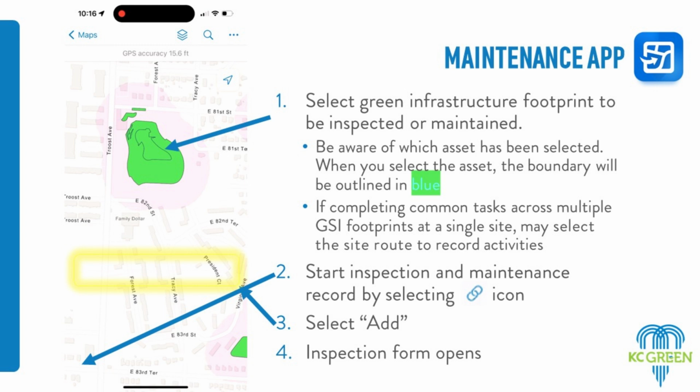The litter index, appearance index, functionality index, that's what Ashley spoke to earlier, the 1 through 4. It should be bang, bang, bang, to be really honest, to go in and do that. When we get into maintenance, there's a little bit more level of understanding of what you need to do. But site inspection should be fairly intuitive and pretty quick at some point. And we need these every single visit, so Ashley can see what you're inputting and we have access to the pictures. It's really important that before you do anything, this happens every single time you're on site: there's an inspection.